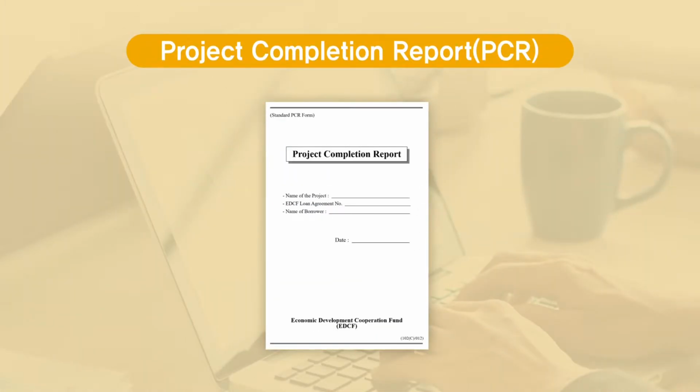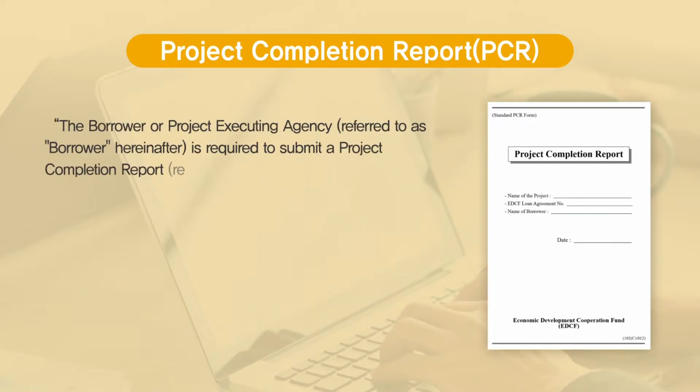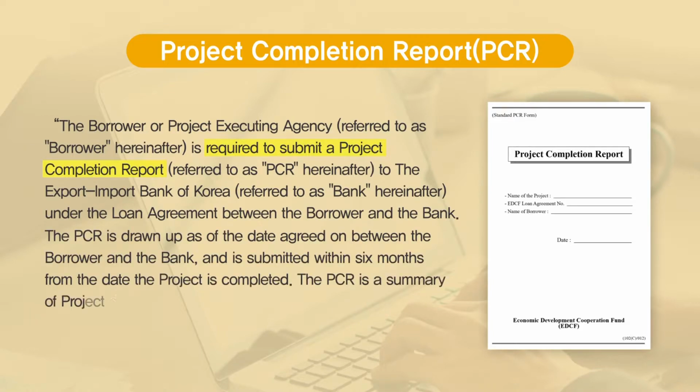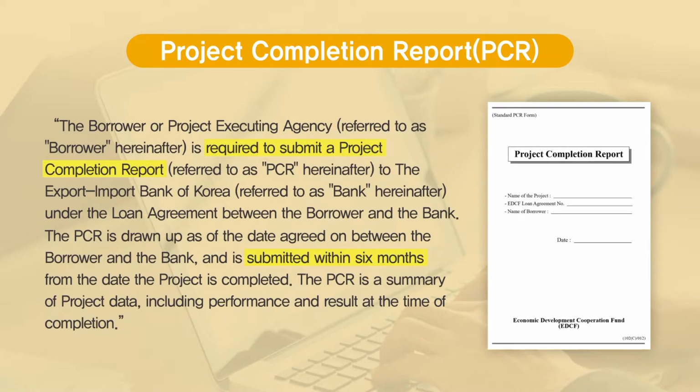PCR is a requirement for EDCF-supported projects and programs. According to the Borrower's Guide for Preparing PCR, the borrower or project executing agency is required to submit a project completion report to the Export-Import Bank of Korea under the loan agreement between the borrower and the bank. The PCR is drawn up as of the date agreed on between the borrower and the bank and is submitted within 6 months from the date the project is completed. The PCR is a summary of project data, including performance and result at the time of completion.